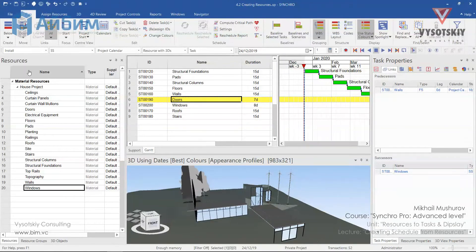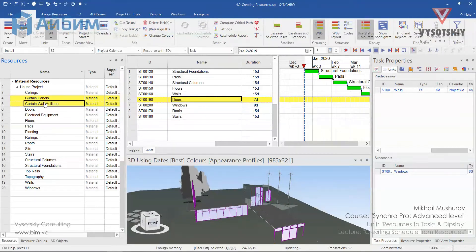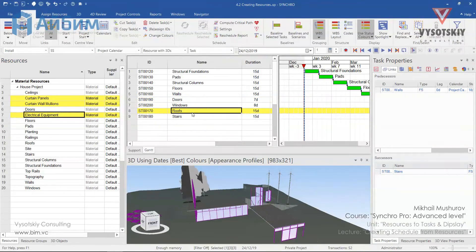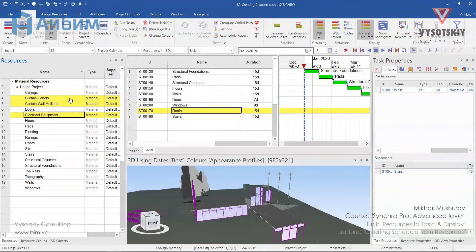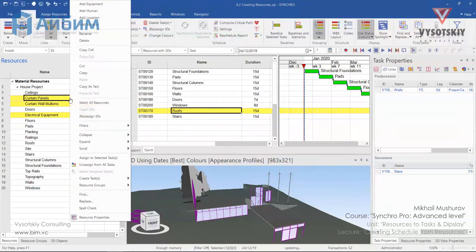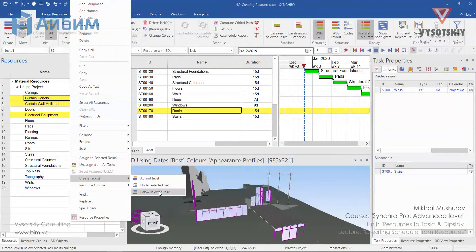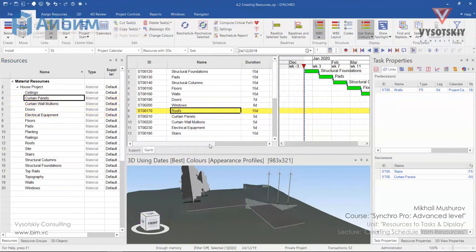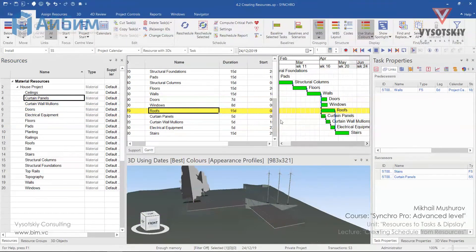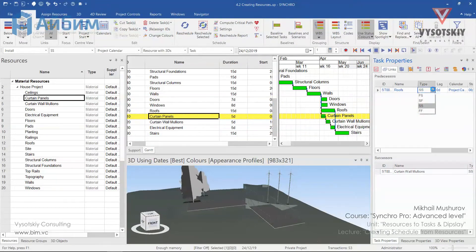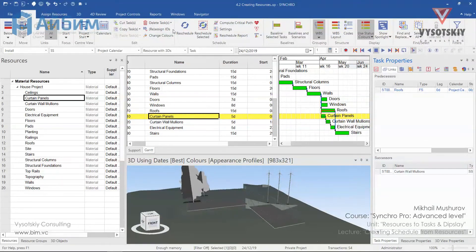Resources like curtain panels, curtain wall millions and equipment. I would like to start them after roof activity is finished. Select roof activity. Make a right click over the resources and select create task below selected tasks. Let's select curtain panel and change the same type to finish to start.